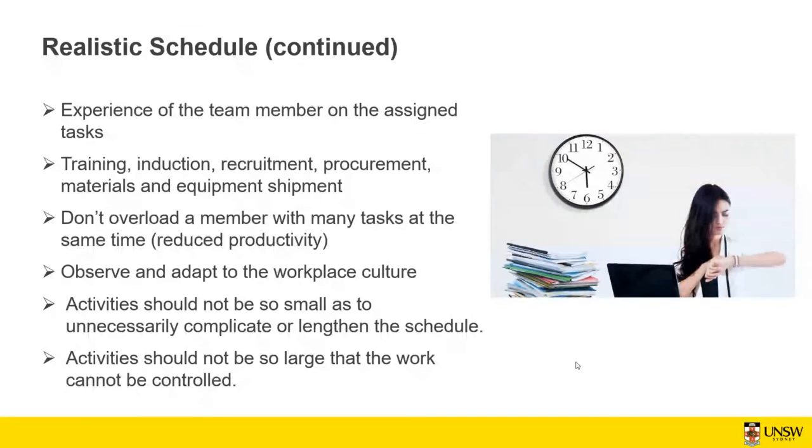And how can you say how much is going to be finished? So if it's possible, it's better to break down this large work into smaller pieces so you can better track when each task is going to be finished. Finishing all those smaller tasks can result in finishing the bigger task.